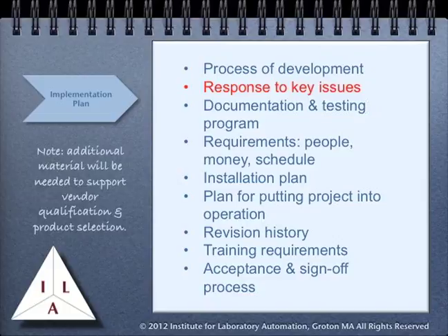In particular, any elements that require research and development before the plan can be successfully implemented. For each research and development effort, the plan should detail the risks and what the alternative plans are if the initial approach doesn't work. It's possible that in some efforts they become a roadblock and require a redevelopment of the design plan. While this is far from desirable, it can happen, and you should be prepared to deal with it realistically.